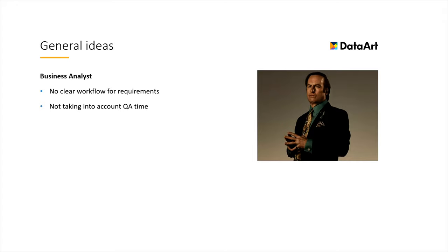Not taking into account QA time. Sometimes first planning and first requirements are done only by the business analyst. He's talking about the time frames, the team sizes are based on that, and he's not taking into account QA time because he was a former developer or he doesn't care about QA. He says that it's not needed. And this is quite a big problem because later you have a fight inside the team that you cannot do this and it cannot be passed on. So that's why this point is here.